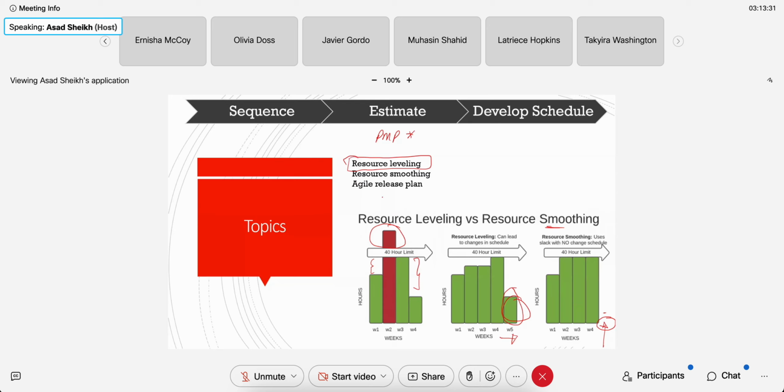In Agile, what they do is they have these release plans. That's how they kind of safeguard. How does that work? Here's a sprint, and here's another sprint, and here's another sprint. So you had 5 user stories here. You're working on them, you completed 4 of them. Then the one that you didn't do, you added to this one. If this had 4, you added that one that you didn't complete here. And that's how you took care of it.